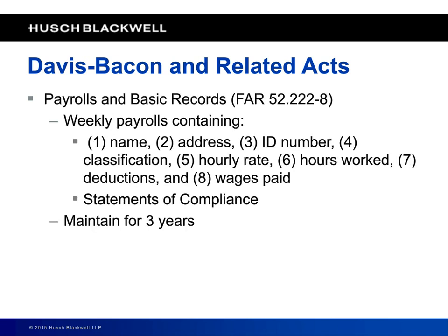The Payroll and Basic Records Clause. This one's pretty simple, although when we get into best practices, there's going to be a lot of additional records I'm going to recommend that you keep in order to demonstrate compliance. But all that is technically required is that you keep the Form WH-347, the wage and hour certified payroll record that DOL puts out. You keep the completed versions of those along with the statements of compliance that accompany them. And those show the name, the address, and all those list of 8 items that I identified there. And the requirement is that you keep those for 3 years.